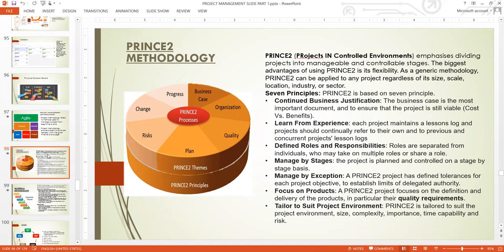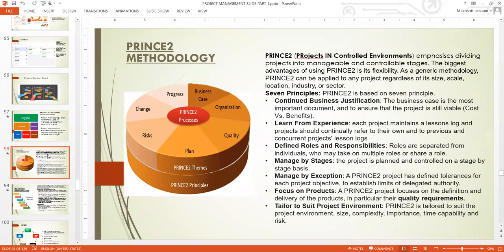PRINCE2 defines roles and responsibilities — roles are separate from individuals, who may take multiple roles or share a role. In PRINCE2, they talk about the project manager role, not about who specifically fills it. PRINCE2 manages projects by stage — the project is planned and controlled on a stage-by-stage basis. Other project approaches do that as well, but PRINCE2 is quite outstanding in doing that.